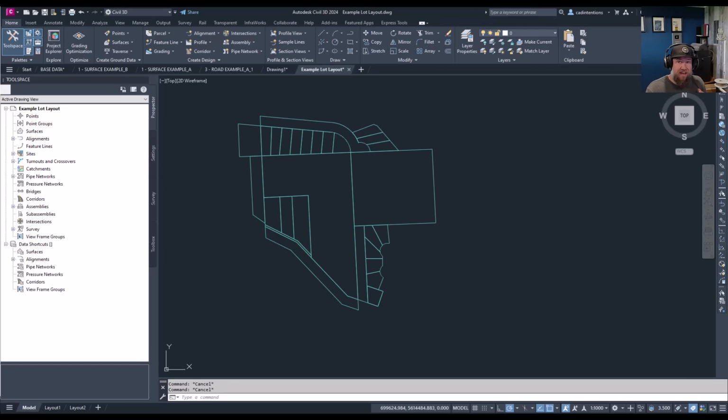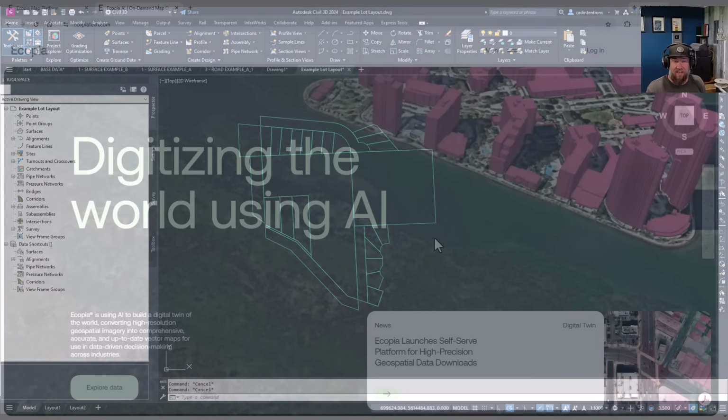And in many cases, this can be the most expensive mistake that we actually make because you're going to design off of a poor base plan or inaccurate data or imagery, leading to delays, issues, errors when you actually go to build this, or having to send out additional surveyors later on in the project, costing extra money. If we simply started with good base data right from the beginning, we'd eliminate all of that, and it also makes our job a ton easier when it comes to organizing and creating an efficient and cost-effective design.